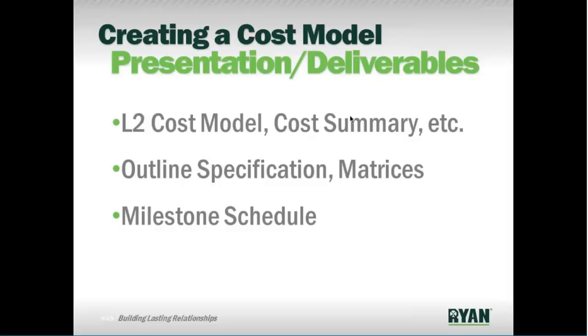One thing to comment on is presenting cost information, and later in the PowerPoint there are some slides that indicate this. Keep in mind a couple things. One is most of the time, clients are going to start with the bottom number, so you might as well go there first and start there to set the context. The other thing is, when you're presenting cost information, think in terms of: here's where we were, or here's the client's expectation, here's what's changed, and here's where we are. The goal is that you're presenting information, not purely data, and your deliverables should reflect that.